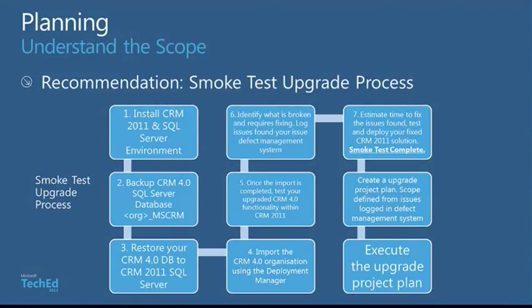Once you've gone through your tests and checked this functionality, that functionality, integration, all that sort of stuff, I recommend you put it into a defect management system so you can manage and log all those. Once you've logged them all, you've got a good picture of what's broken and what you need to fix. That's where I call the smoke test complete.